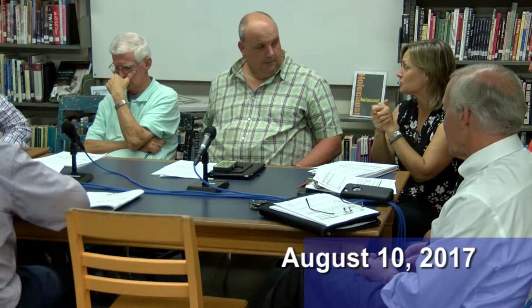Right now, we're very close with their estimates, remembering that the MSBA provides $1,200 per student as a contribution. It's not apparently meant to furnish your entire building, as we were reminded recently at an MSBA event. Back in the day, it did handle everything, but right now, based on Stifora's estimates, we're at about $1,215 per student as we go into this process. And again, we have the ability through bidding to either accept or not accept certain things.